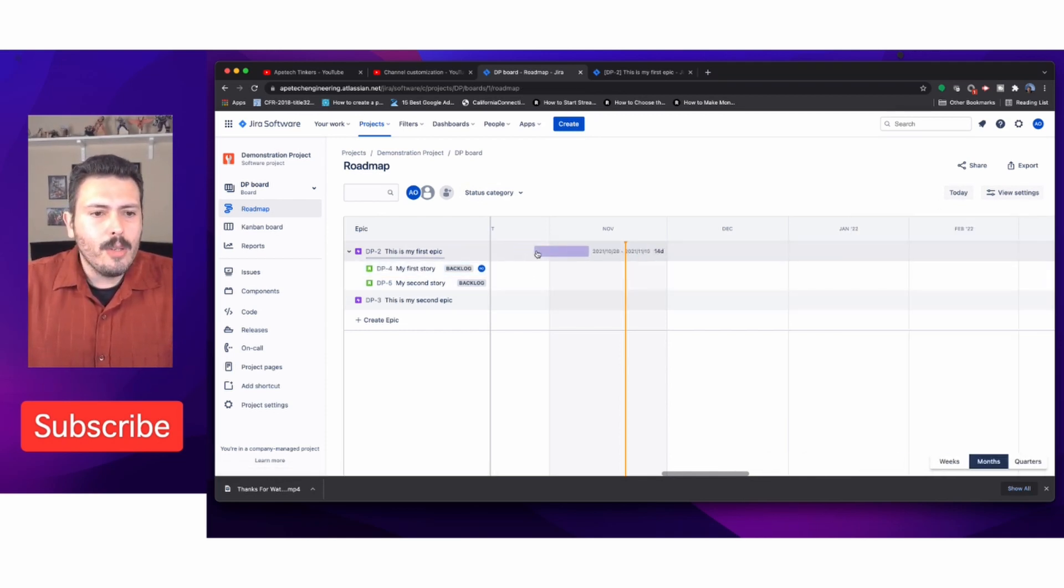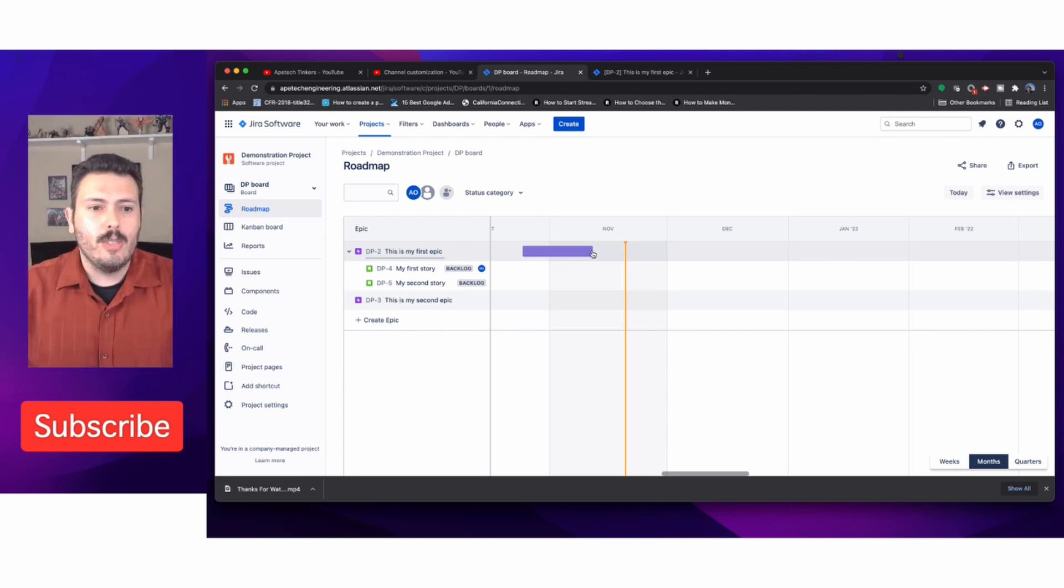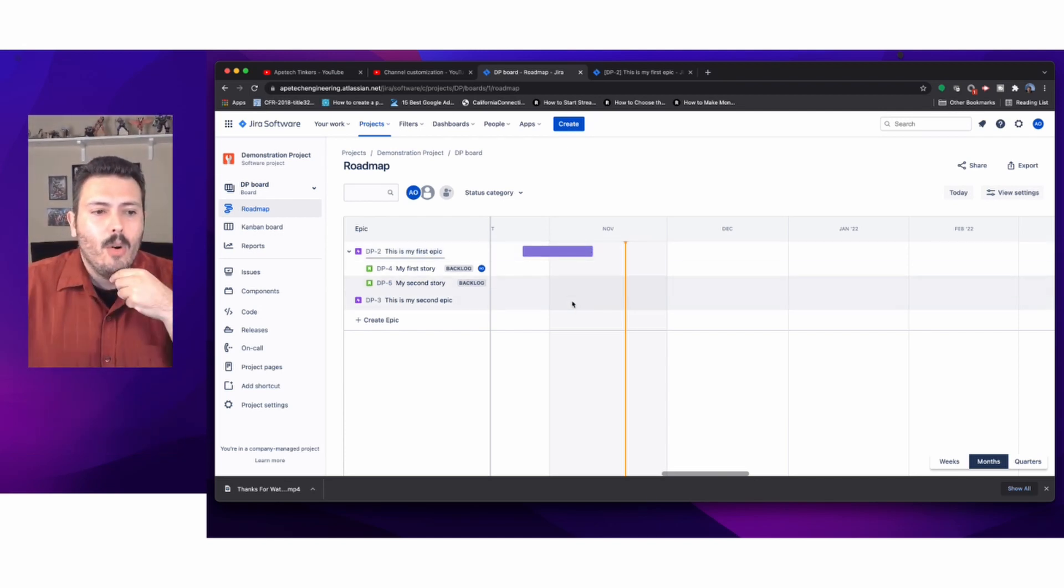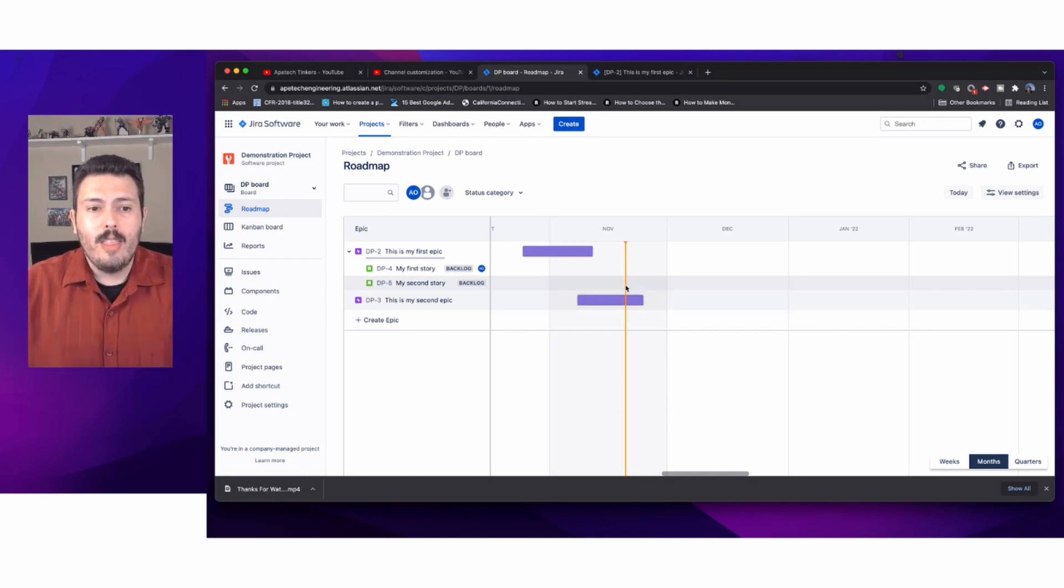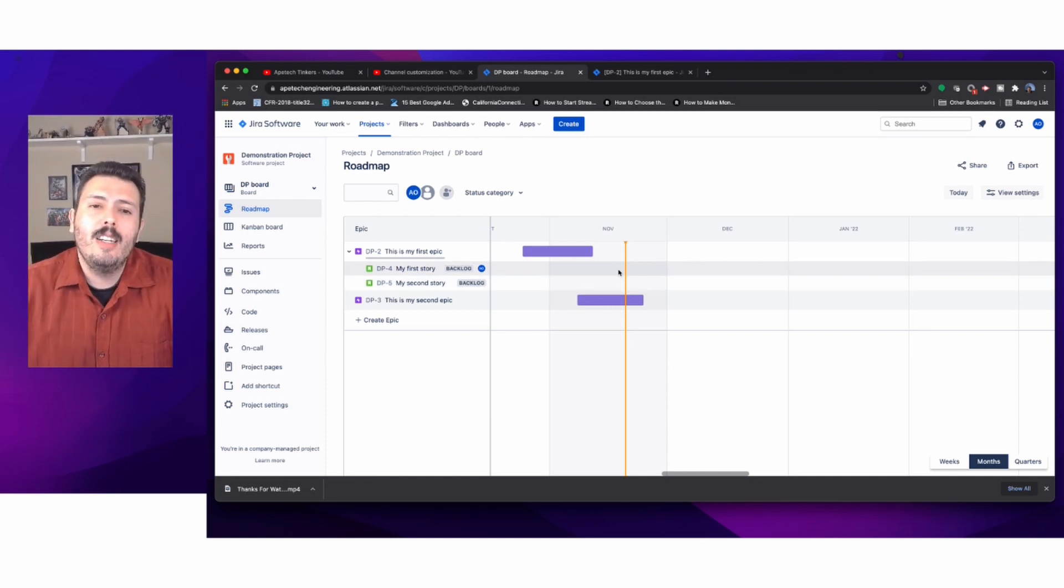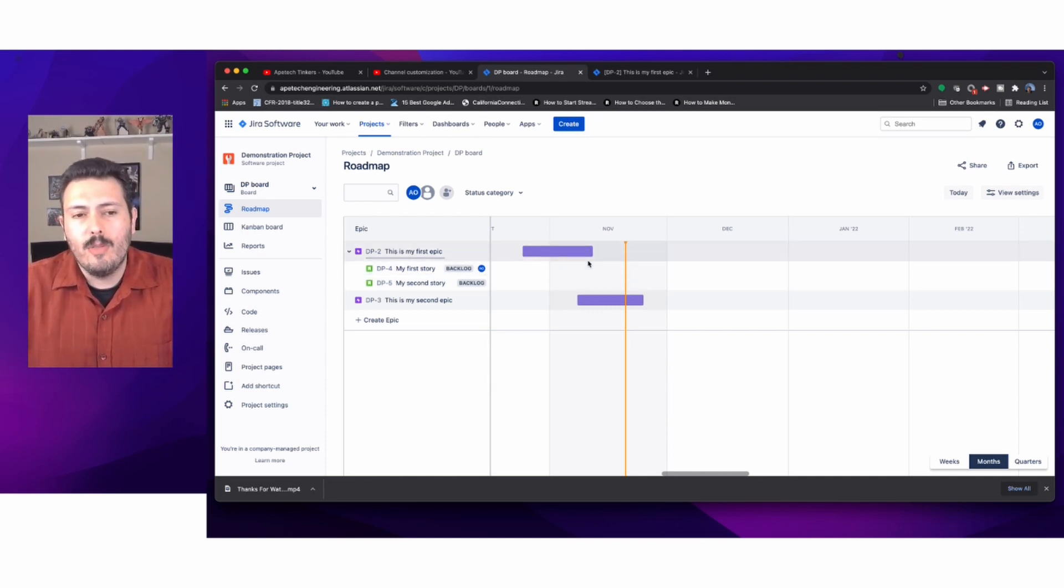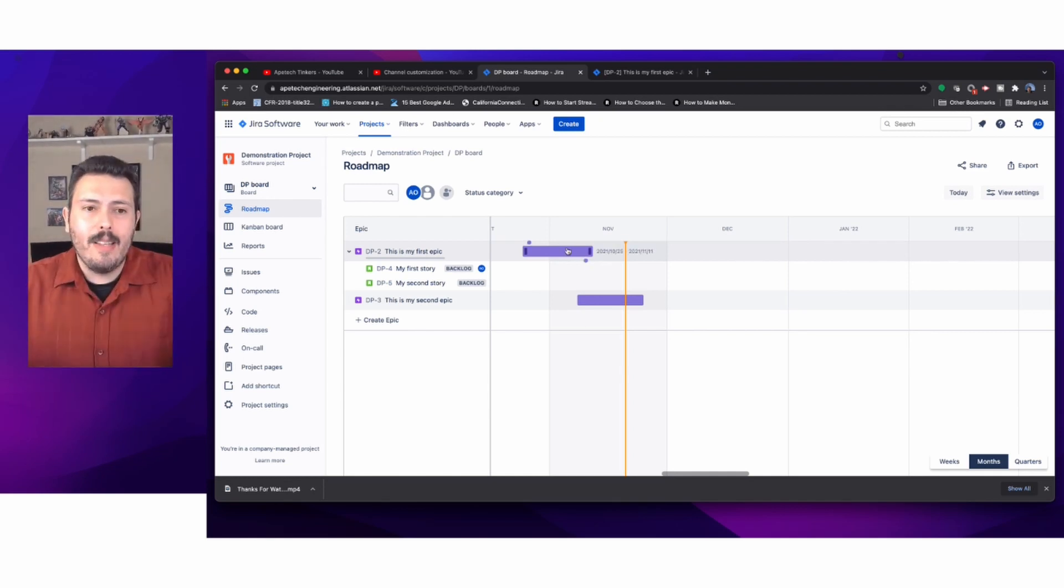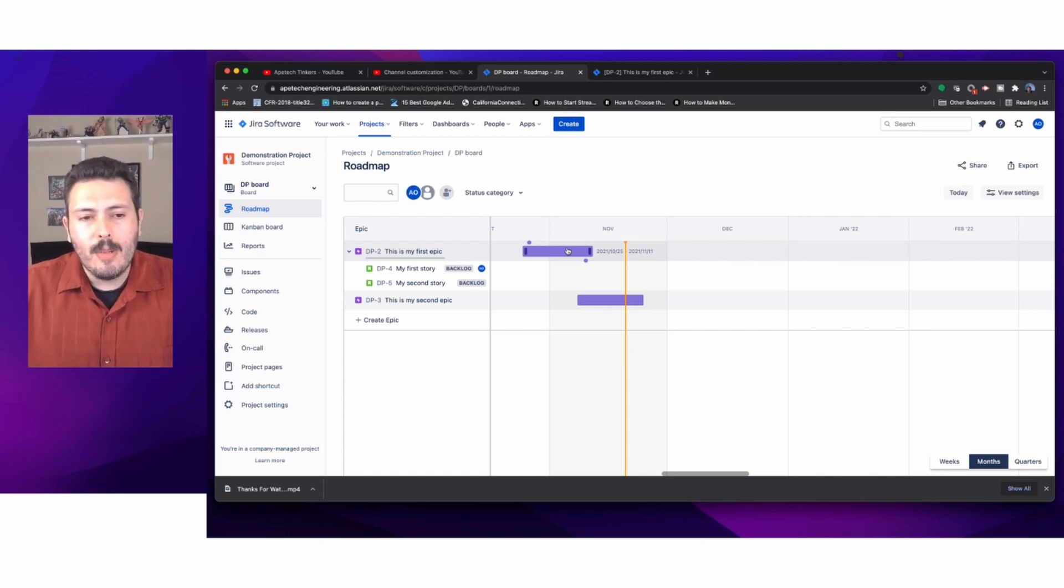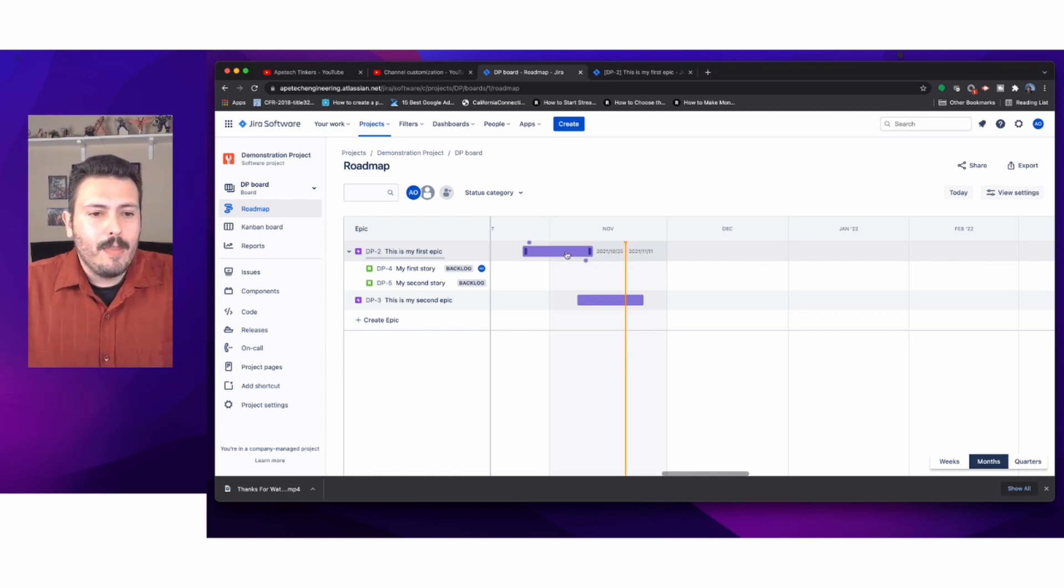This Today view and settings, once you create this, you can put dates. This sets the start and end date for your issues if you project manage in that way, where you're interested in putting dates on your epic to pre-plan when things should be done. That's not typically 100% agile.